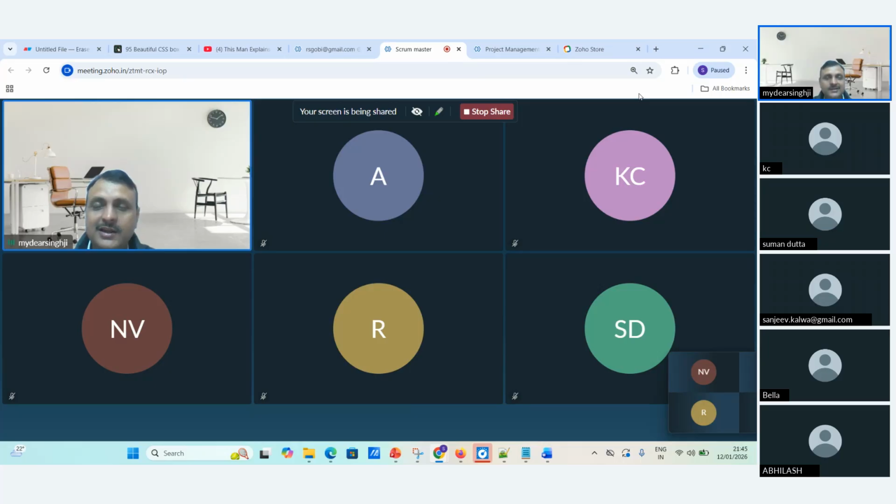So here they're saying responding to change over following a plan. We accept the changes. Previously, I would not accept your changes. Whatever the plan was, I'm just going to check that and follow that. If you want to change something, it would come with change control board approval, all these things would happen, then I would change. But here in Agile, we are accepting the changes. Is it clear? All four?